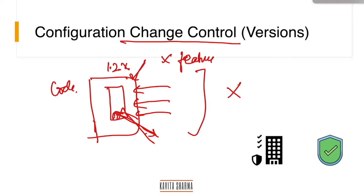So there is a change control system which needs to be in place. The changes are locked and the changes are labeled so that whenever we roll out this version, it is the right version which is rolled out. A lot of tools allow you this kind of restriction or flexibility.